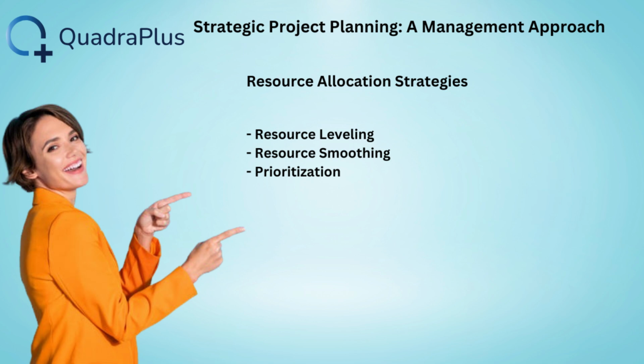Example: event planning. Imagine planning a large corporate event. The critical tasks, such as securing the venue, hiring keynote speakers, and setting up technology, must be completed before focusing on decorative elements or promotional materials. Prioritization ensures that essential tasks receive attention first.